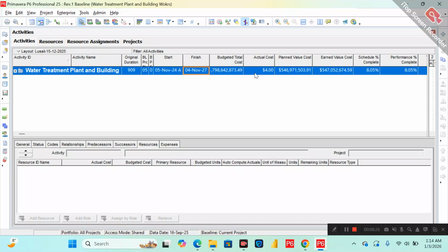So you see, I have uploaded the cost as units again. Even in the beginning it was uploaded as units, but I re-imported it again as units to show that you should always check whether your cost is uploaded as an expense, as budgeted units, or as a budgeted cost. So make sure it is budgeted units. It was already available as units in my program, but I also re-imported and exported again, to show you.